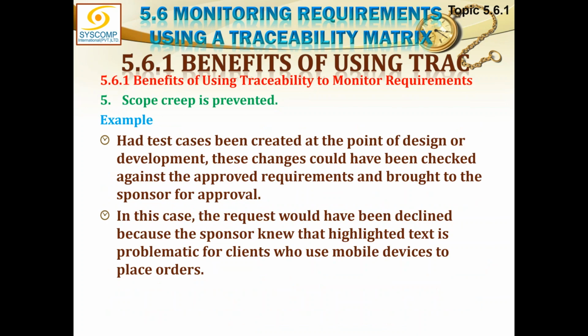Had test cases been created at the point of design or development, these changes could have been checked against the approved requirements and brought to the sponsor for approval. In this case, the request would have been declined because the sponsor knew the highlighted text is problematic for clients who use mobile devices to place orders.